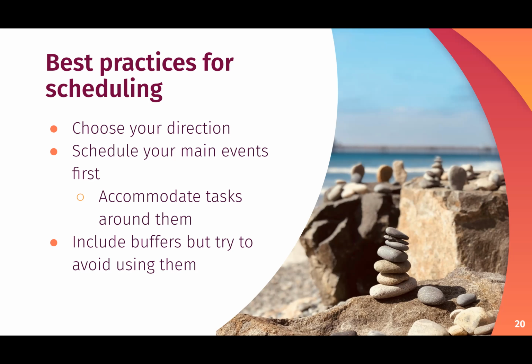They don't know that. I know that. So I've added that buffer, but I'm letting them think, oh, okay, I need it by July 10th, because I want to make sure that I have them, because I know someone will be late. But this way I can manage those late chapters better than if everyone is going to the deadline. So I would say include buffers. If you can add buffers to the buffers, that's awesome.